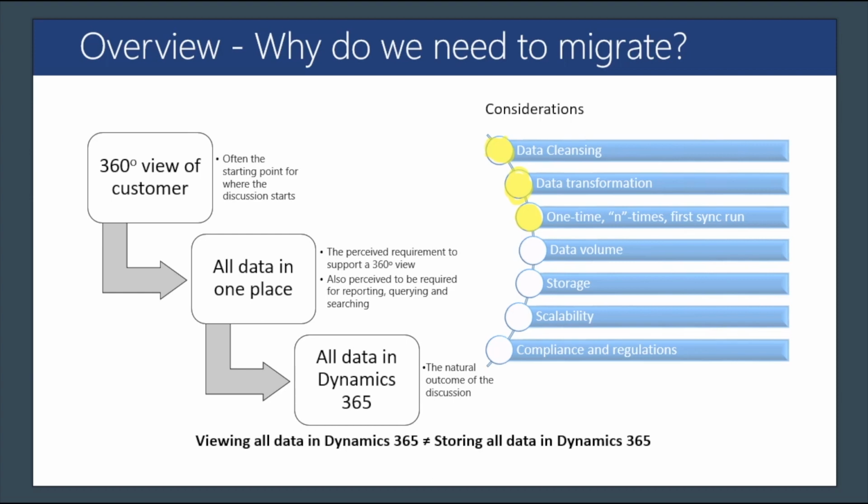And you're going to move only that small piece of data, and that actually is achievable within a couple of hours, and you're good to go live on Monday morning. So that's things to consider and things to recall whenever you're dealing with such a migration. It might be a very common sense question or topic, but it definitely makes a difference when you're actually migrating the data or planning to do your migration, and then considering how to do it.